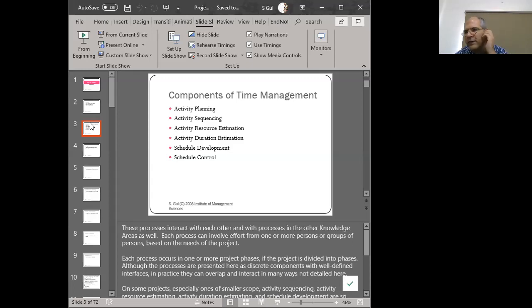So what if we have two people, right? If we've got two people, then we've got one person doing 8 hours, the other person doing 8 hours in a day, so that's 16 hours. 16 plus 16 on the second day is 32 hours, so two people is not enough. What if we've got three people? If we've got three people all working full time, that's 24 hours in the first day, 24 hours in the second day, that's 48 hours. That's 8 more hours than what we require in those 2 days, where we're looking for 40 hours of work.